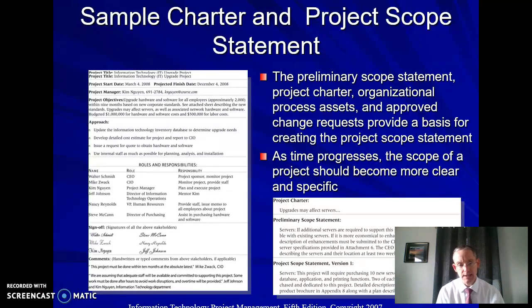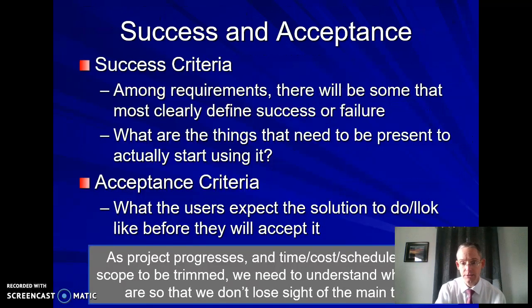When you're defining scope, two of the simple documents that start out the project are the project charter and the scope statement. Okay, charter basically says we are allowed, the company has agreed to, we're going to do this project, and here's the basic boundaries of it. The scope statement itself is going to be a more detailed list of here's the project in specifics. Here's, as we talk about what the executives agree to, as the technologists, here's what we're going to go actually execute to.